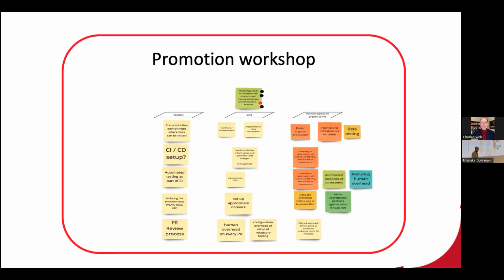And so we said, take those major threats that you identified. Remember those top 5 in the top right-hand corner of that chart. Take those 4 or 5, think about them, think about what your solutions are likely to be and roughly what the costs are.